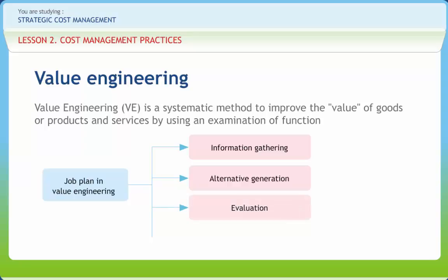Next, evaluation. In this stage, all the alternatives are assessed by evaluating how well they meet the required functions and how great the cost savings will be. Next, presentation. In the final stage, the best alternative will be chosen and presented to the client for final decision.